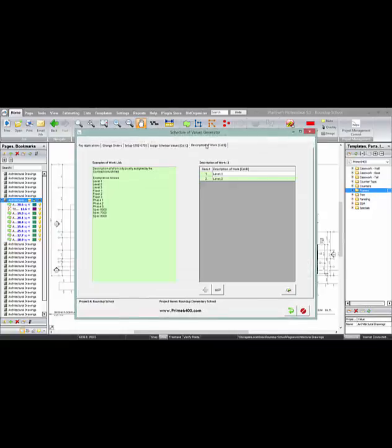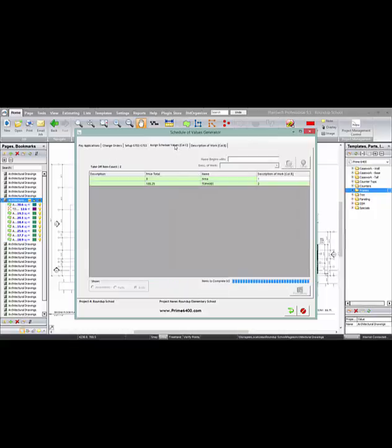Additionally, we've got a schedule of values generator. Within here, we allow the user to state what they want to put in under column B of the 703 form. So this could be by level, by floor, by phase, by specification section, and allow you to list what you're looking for in this area. Once that's completed, it'll also show you each line item of the takeoff, and with that, we want to assign to it what breakdown you want it to be associated with.